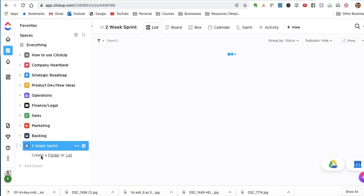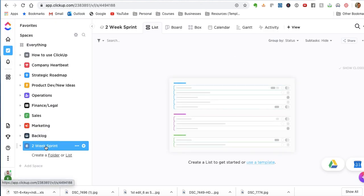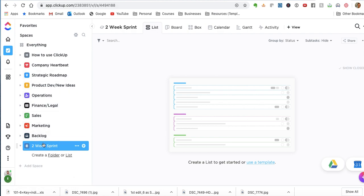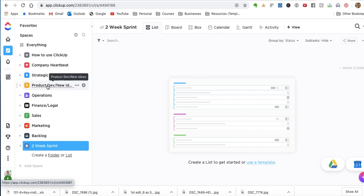Now, I've got this space in here. This two-week sprint, this is really where we spend the majority of our time. So even though we have all the different departments, as the manager of the company, I will say, okay, this is my top priority for this two weeks. Or maybe if it's at the end of the two weeks, starting to create what's top priority for the next two weeks. And I'll take a look at all the different departments and pull tasks from there.